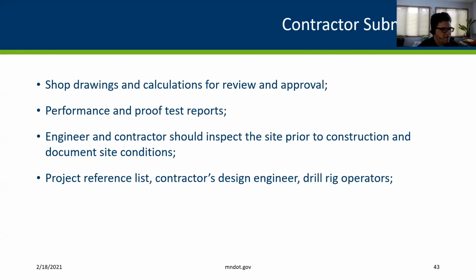But the soil nail is proprietary, and there can be many different types of soil nails. So they need to provide a shop drawing showing the placement of those soil nails and calculations showing that the soil nail meets the requirements that we specified in the plan. So that's what we'll be reviewing and approving. And again, that would be reviewed by the foundations office and our office and the engineer of record.